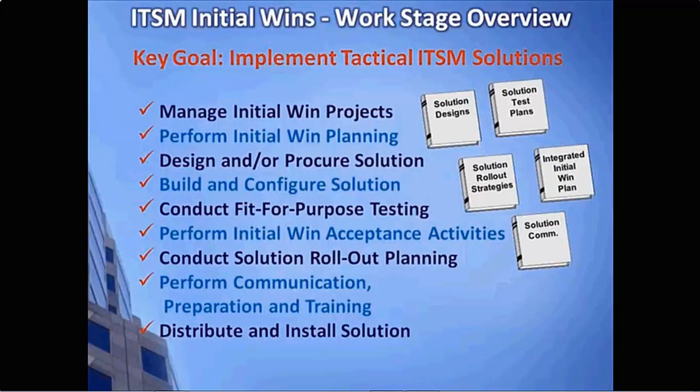Some of the key steps with this, as you see, kind of mirror that approach. Besides managing each individual initial win project, we're going to do some initial planning. We're going to design and procure the initial win solution, build and configure that solution, conduct fit-for-purpose testing, perform some initial win acceptance activities, do some rollout planning, communication, preparation, and training, and then distribute and install the initial win solution as we go forward. Again, a lot of this approach looks very familiar to the release and deployment process which exists within ITIL.